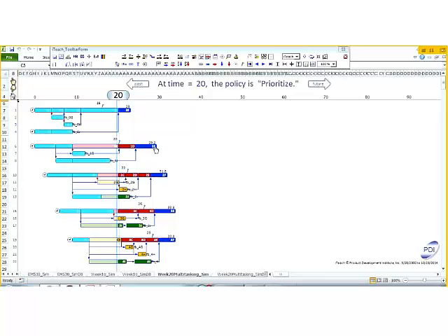So we've decided we're not going to be multitasking. That means this project is going to finish at a full level of effort, and maybe we're going to have a project buffer on the end of it, but it's going to work off something like this. Now this project, if we're not going to multitask, we can't continue this remaining work at week 20. So we should probably adjust this model to represent the new policy.